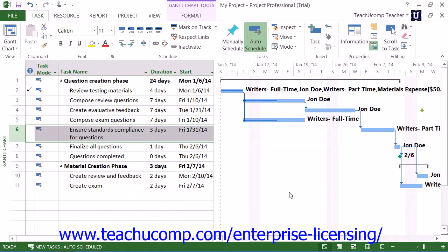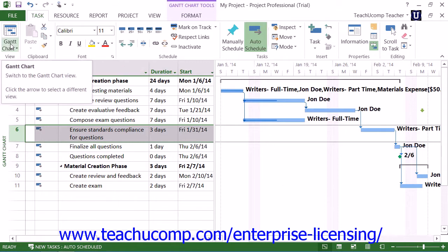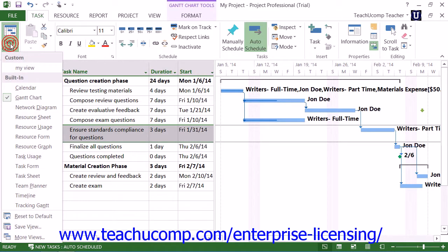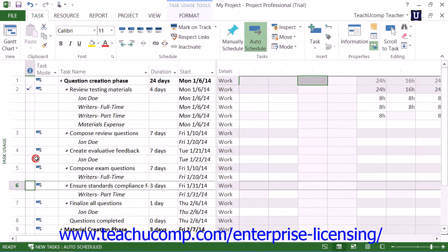To apply a work contour to a task, switch to the Task Usage view of the project file by clicking the Gantt Chart drop-down button that appears in the View button group on the Task tab in the ribbon, and then selecting the Task Usage command from the drop-down menu.